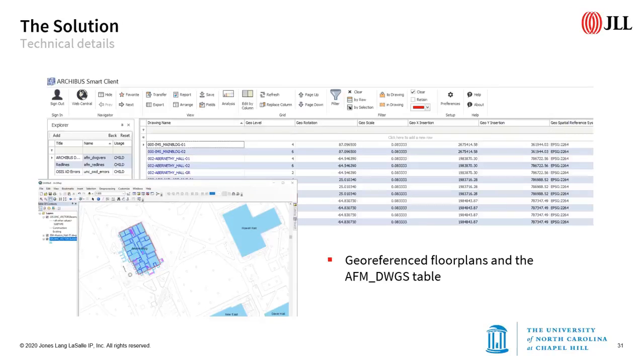One lesson that we learned here was that the method we originally used to georeference the drawings was not the method required here. So we still had some additional work to do to get this piece completed. So maybe if you haven't georeferenced and you are thinking about going through this process, look into what is required before you set out to do that.